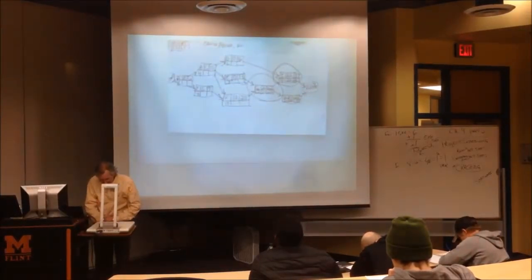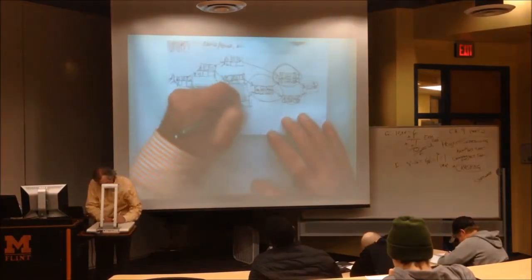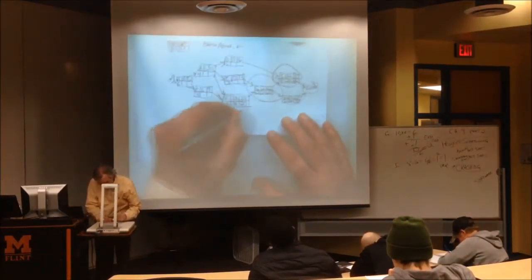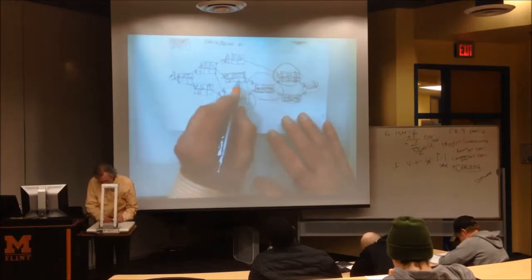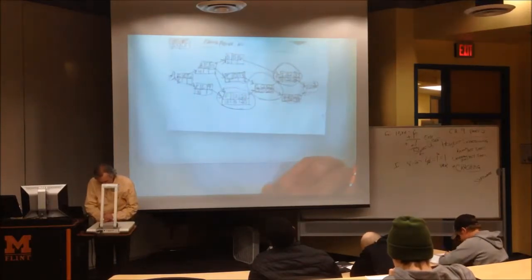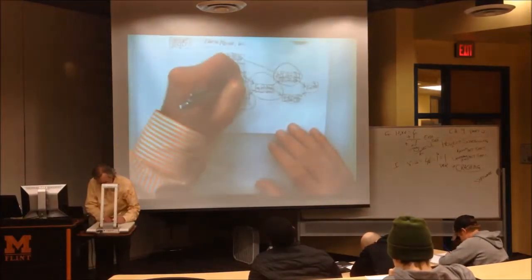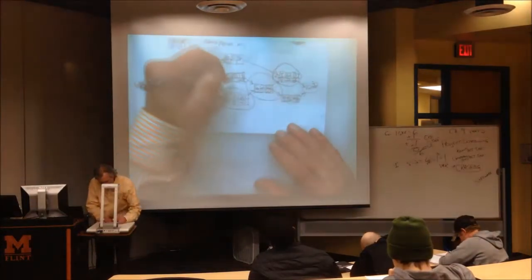Now we're going to F. F can finish as late as 20. Subtract 10. We're at 10. Another critical activity. E could finish as late as 20 also, because it only has G after it. Subtract 3 puts it 17.